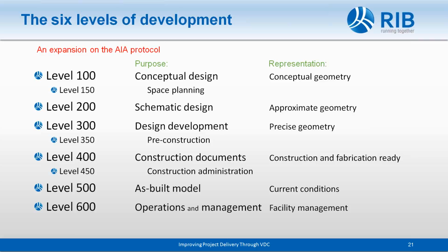Now, some objects within the overall model never need to rise above, let's say, level 300. That's not a bad thing. You don't need to fully load every single object in there to use the model as a whole for construction document purposes.